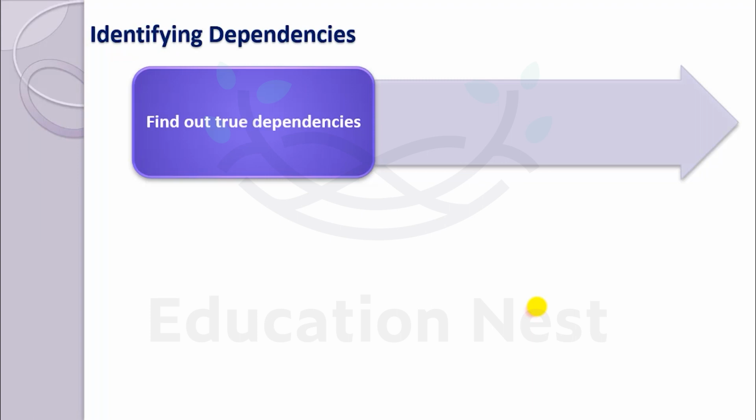Since they don't want to give the whole chunk to you, it can happen. So there could be a dependency: for a website the content is important, so certain crucial content could be given to another vendor. So it's very important to know what the true dependencies are and how they can impact your project. Identifying the true dependency is the first step for expert project management.